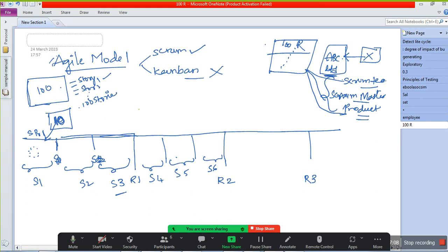Now in the first sprint, out of these 10, they are able to achieve all 10. What will they do the second time? They will take some 8. Consider they take 8 stories in the second sprint. They complete 7 stories because those are critical stories, but one story is left out because some milestone risk came, so they couldn't achieve it.